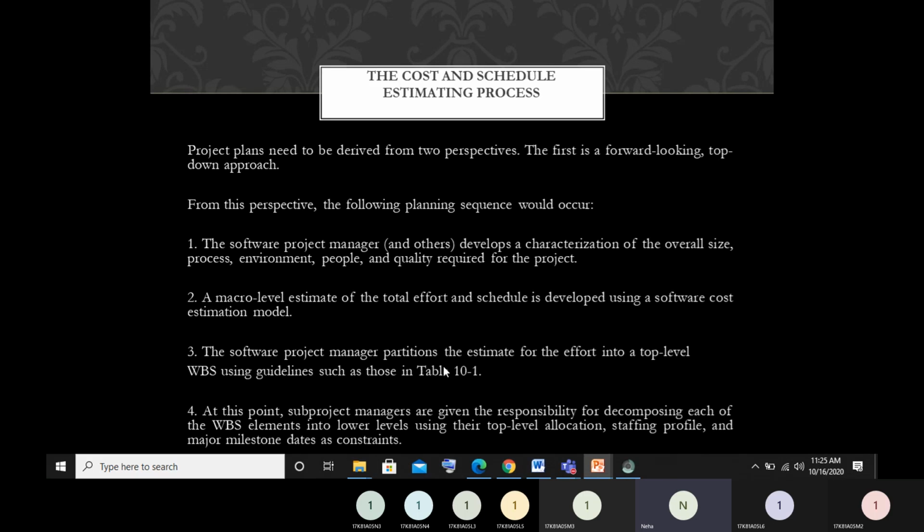And another thing is the budget on the different labor categories into these numbers. For example, your management requirement, in this way we have to divide how much labor work is there, how much technical work is there. 25% of the budget is taken by your complete implementation and testing part. Then employ personnel with an average of some time required to be spent. All these things together make a good project.